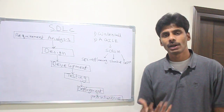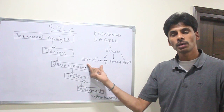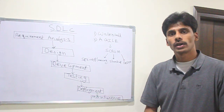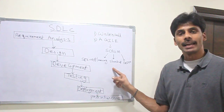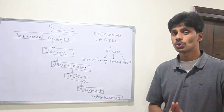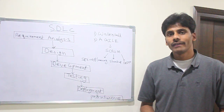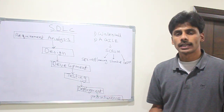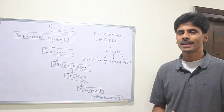If the product can be logically used by an end user, we can deploy it at the end of each sprint. At the start of each sprint, we do sprint planning where the business analyst, QA, and developers sit together and decide what items from the backlog can be brought in. During the sprint, each day we have a stand-up meeting where everybody meets and we have a scrum master whose job is to ensure everything is going smoothly — developers and QA share what they did that day, what they will do tomorrow, and if there are any impediments blocking their work.